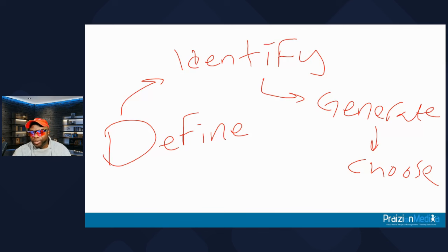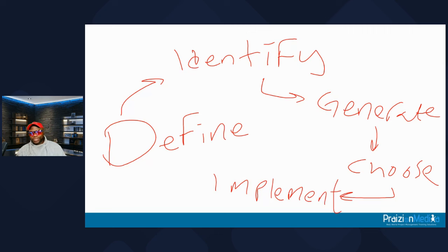And then think about it as if this was in the real world: if I did implement this, would it solve the problem? Like the question that said, tell the stakeholders we can't do that. Does that solve the problem? Really? It doesn't. And then the last step is you've got to verify that your solution actually worked.